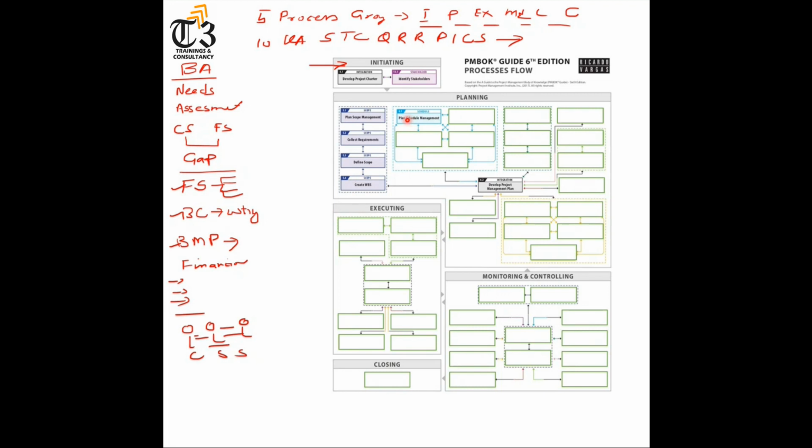Once you have set the approach, then you will start defining the activities. And to define the activities, what will we have? The scope baseline as an input. So I will get two major outputs, the activity list and the milestone list. If you cannot identify the activities as of now, we will leave it as a planning package and we will collect the activities based upon progressive elaboration.